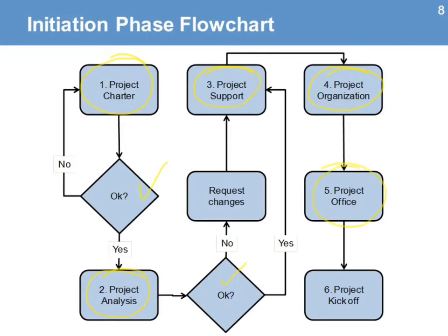This includes the physical space the project team will need to work, including use of computers and access to online systems, and obtaining all the resources and services the project will need. When all is ready, the project manager will organize the kickoff meeting to officially start the project and present the project to the team and to some key stakeholders. In the next units, we will learn in more detail each one of these steps.